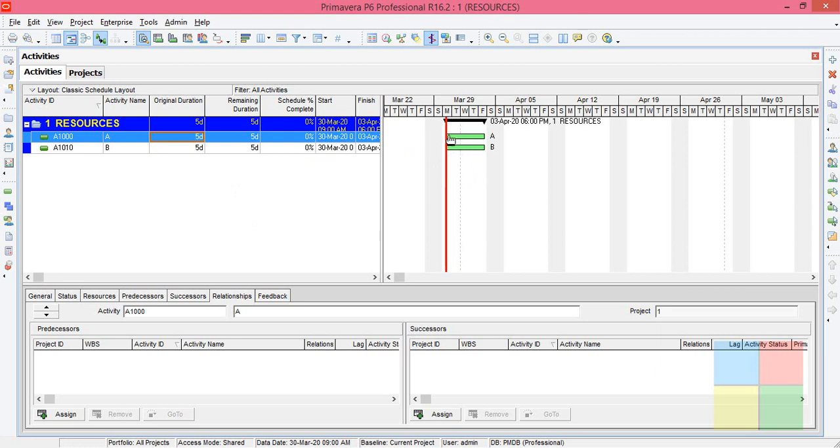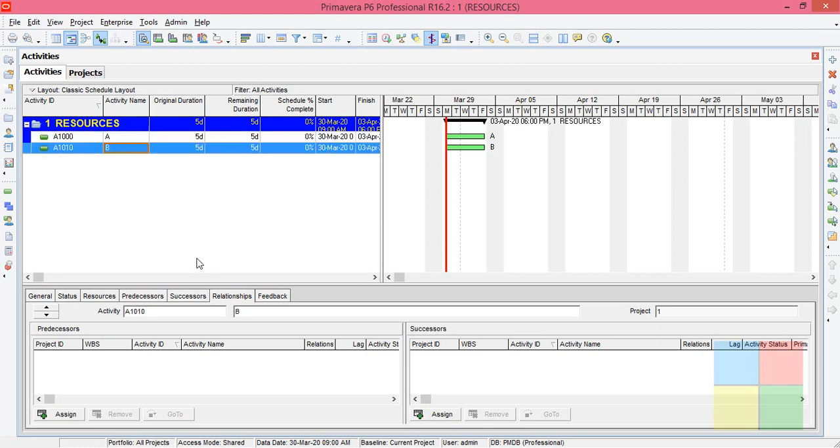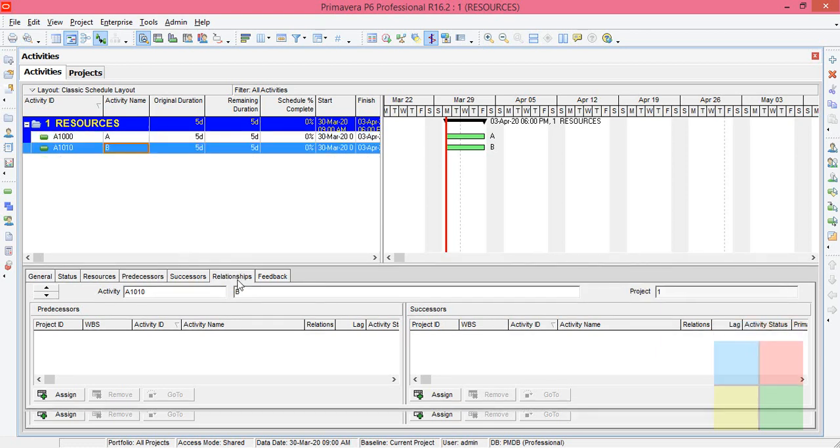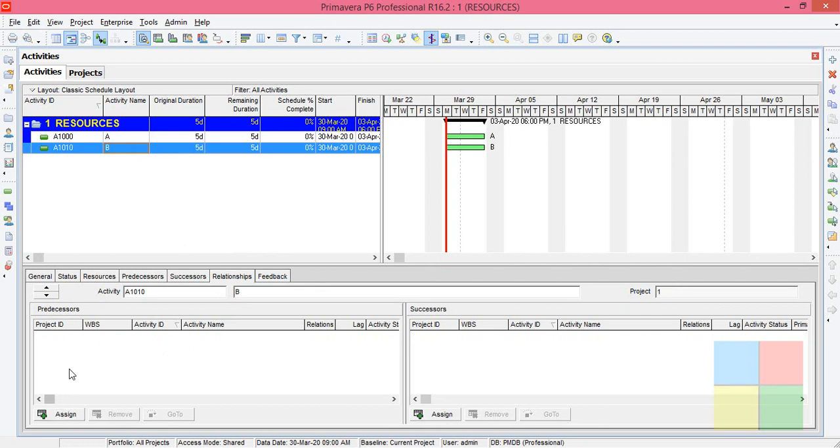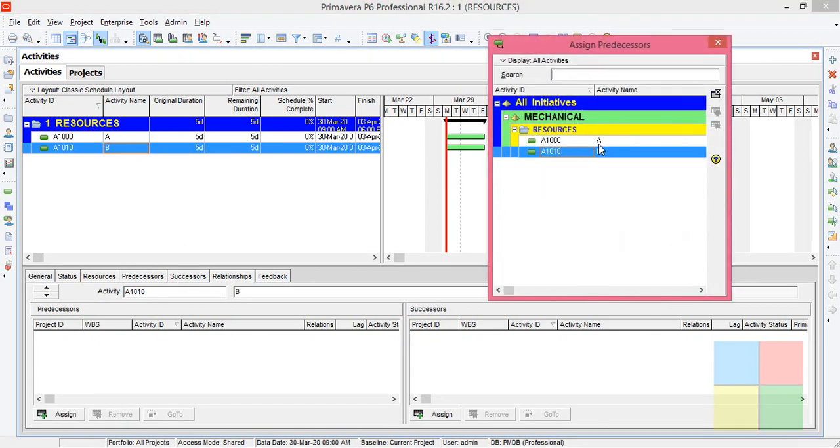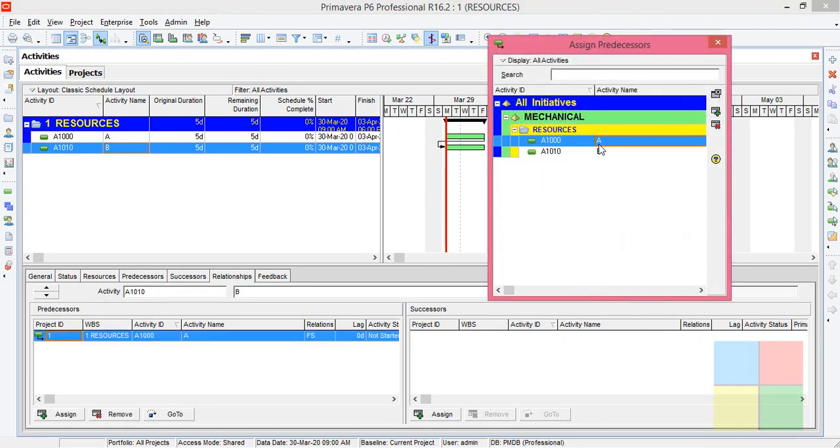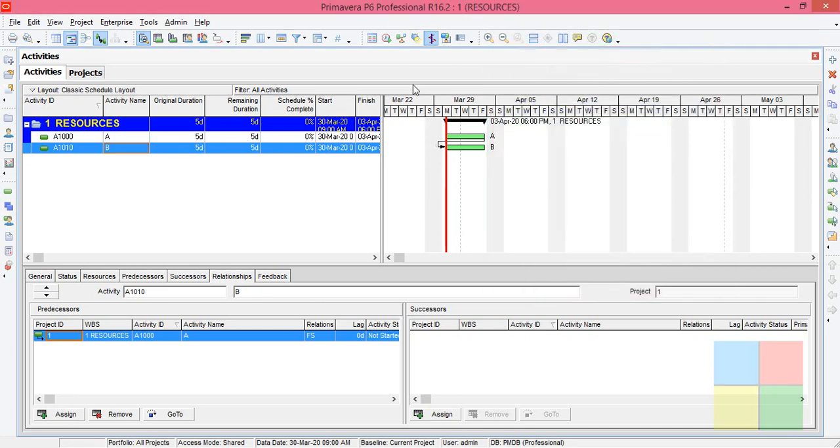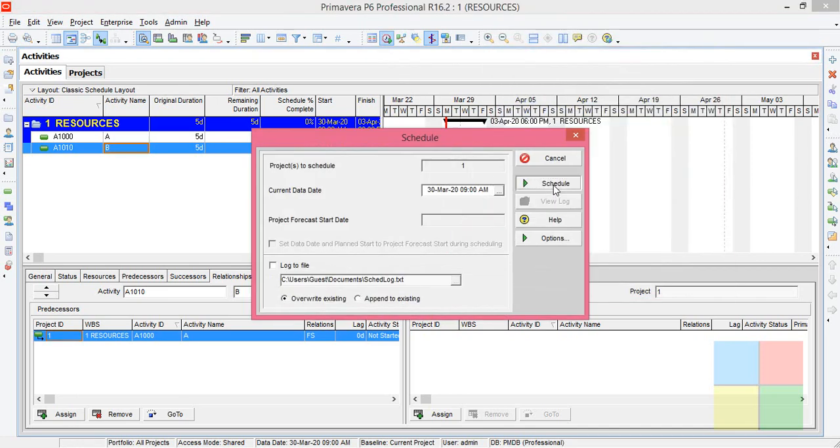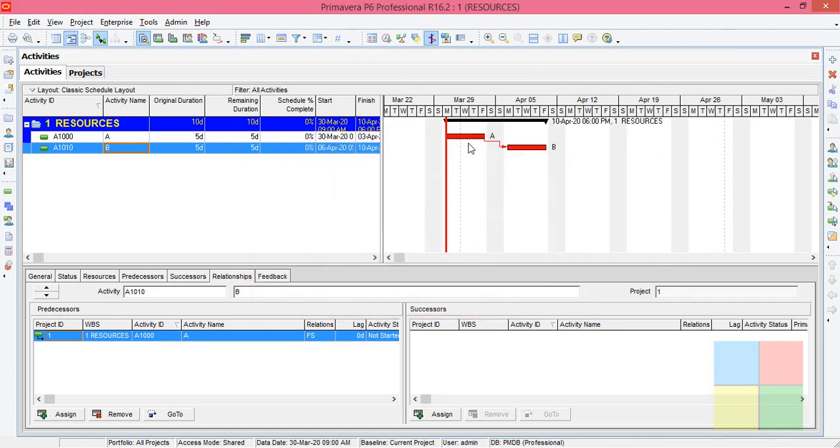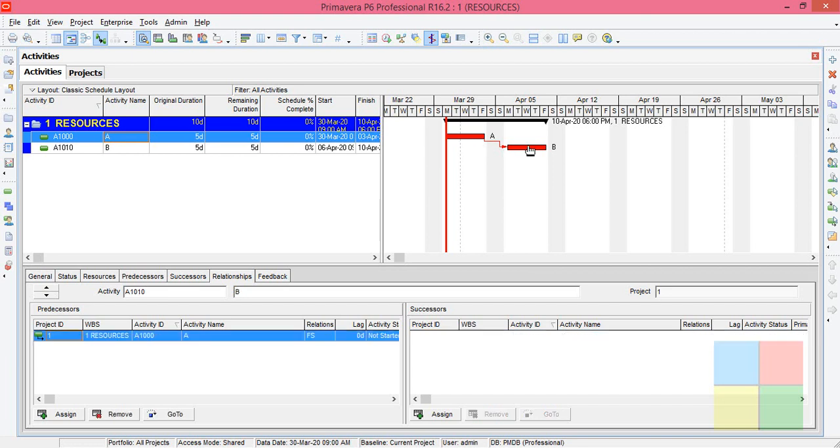Since the activities don't know when to start, they're starting from the same start date. Both activities, I'll assign a simple relationship here for the B activity. I'll highlight B activity, then go to relationships, then in the predecessor column I'll assign the A activity as its previous activity.